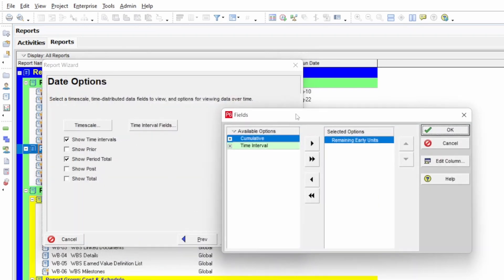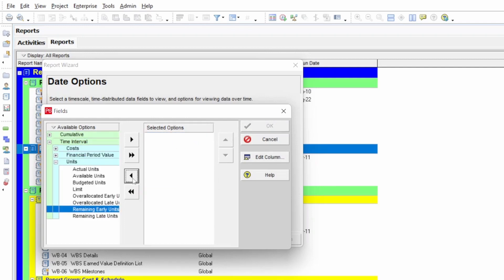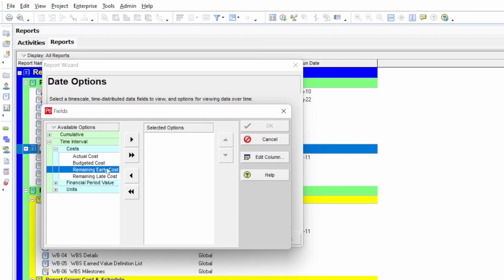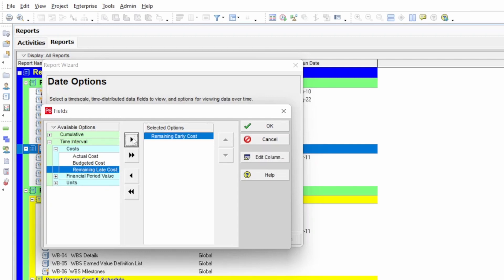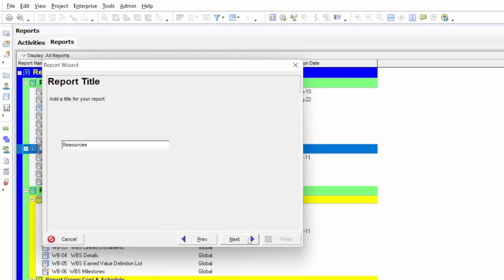Press OK, then go to 'Time Interval.' In the time interval settings, we have 'Remaining Early Units' — Units is for labor effort, so we take it back. Minimize the Units option and open the Cost option. Here we have 'Remaining Early Cost' (the early cost values) and 'Remaining Late Cost' (the late cost values). Select both of these and click Next. I label my report '1234' so it's easy to identify.